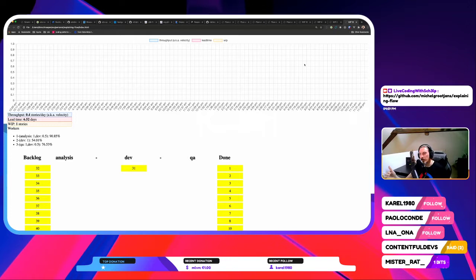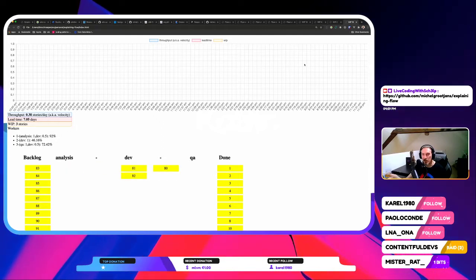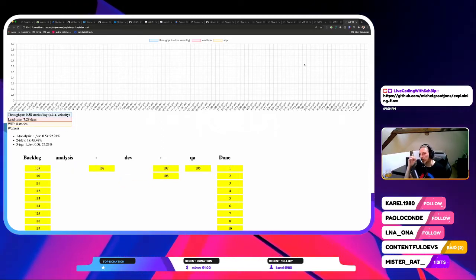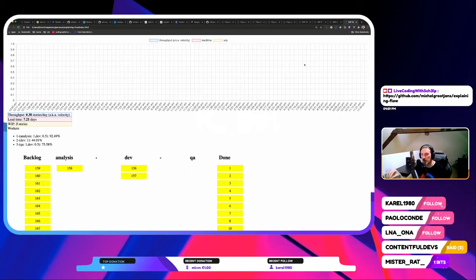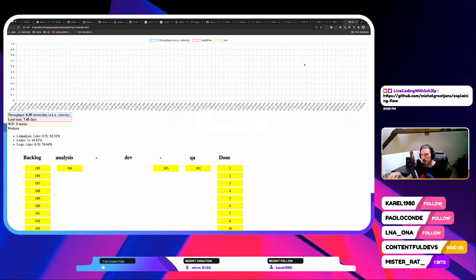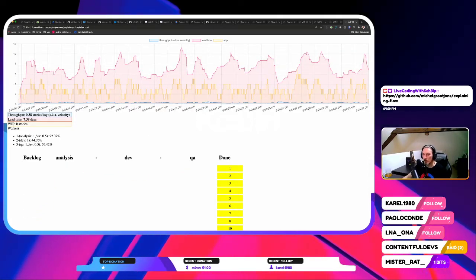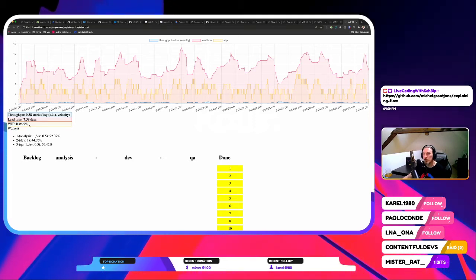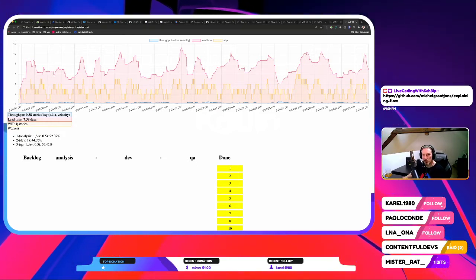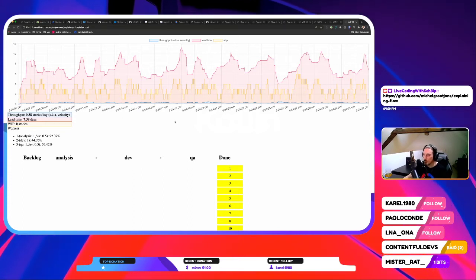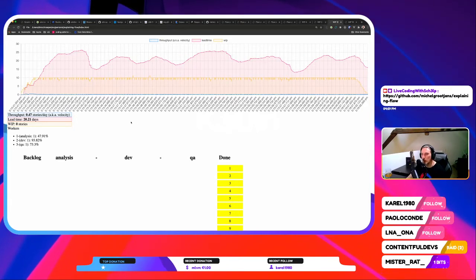So basically this is, in a general sense, the analyst has invested in their growth by learning how to also pick up development stories, or help out at least with those things. And same for our tester. Of course these are just numbers, but what happens? I don't know if some of you noticed, but the work in progress of the stories, even though it was set at 10, I don't think it ever went above 4. So now our lead time, if we compare it with the 10, goes from 20 to 7.